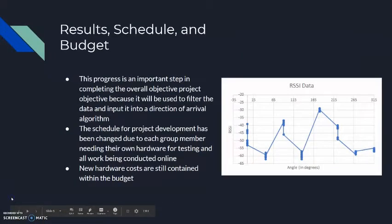This progress is important because the data will be filtered and then run through a direction finding algorithm. Furthermore, the project schedule has changed due to each member needing their own hardware and work being performed online. Finally, the cost of new hardware that has been ordered does not exceed the budget for the project, and this graph on this slide demonstrates some data that has been collected for a specific Wi-Fi network and the strength of the signal depending on the angle of the software-defined radio.